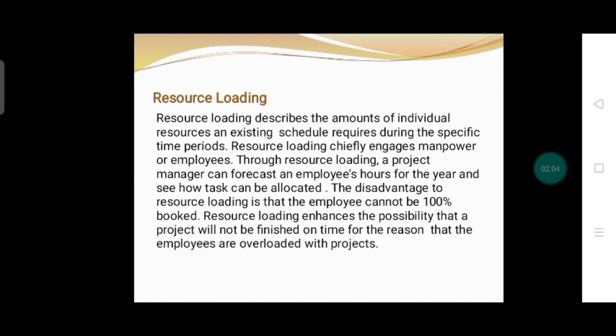So the next topic is all about resource loading. Resource loading describes the amounts of individual resources an existing schedule requires during specific time periods. Resource loading chiefly engages manpower or employees. Through resource loading, a project manager can forecast an employee's hours for the year and see how tasks can be allocated. One disadvantage of resource loading is that the employee cannot be 100% booked.